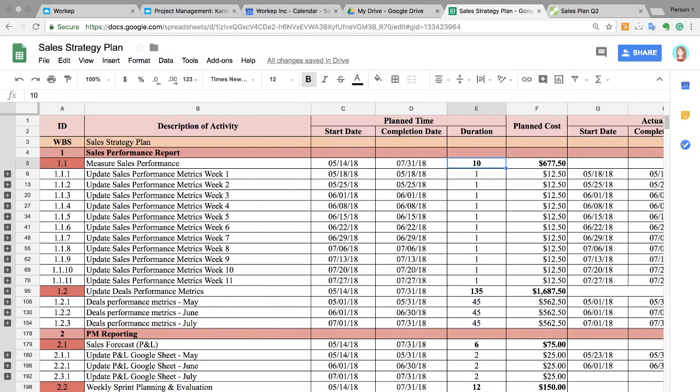The reason why we do duration within the waterfall methodology is because cost is also an important factor of the waterfall method. So estimate time duration is done so that we can then make some estimates about costs. So what the activity is going to cost us, and how that might affect the overall budget of the project.